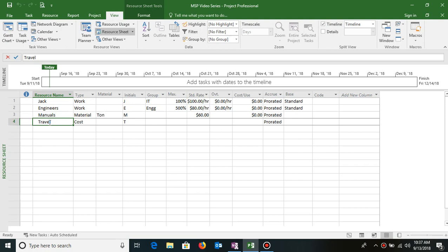So one of the requirements that you might have in your project is that when it comes to work resources, their availabilities might be different compared to your project calendar. Like if I talk about Jack, he might be sitting in a different location, like in the Middle East or in the US, wherein his working timings, his working availability, his holidays would be different compared to your project calendar. So that is one need you might have.